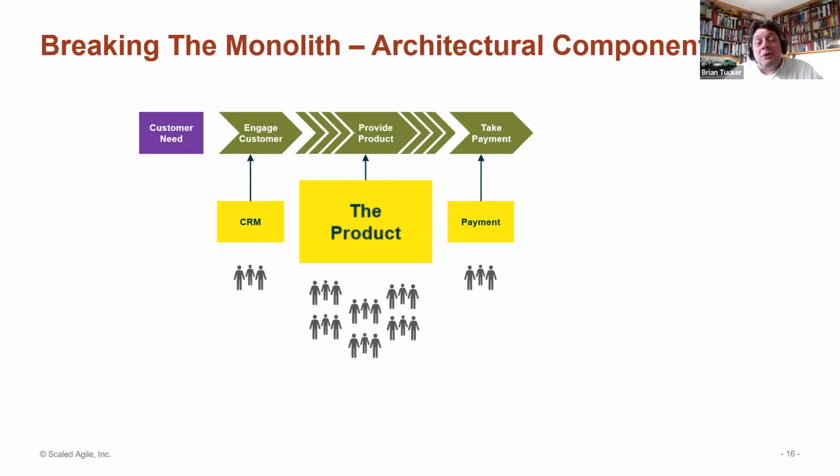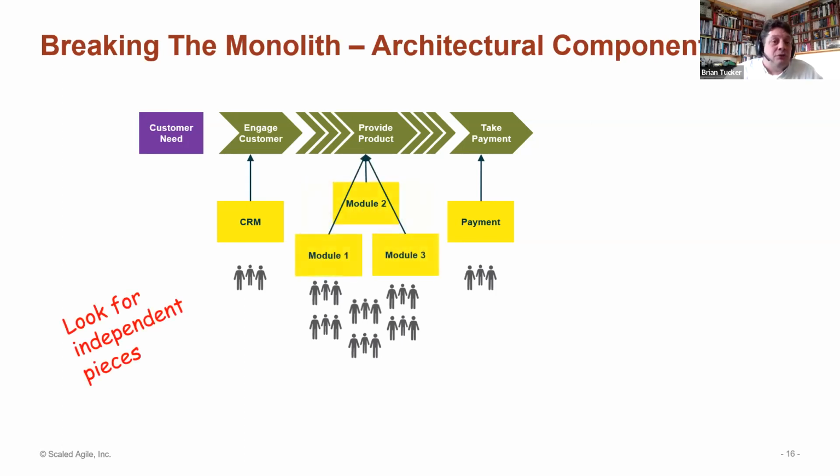Are there any subsystems, components, pieces of the monolith that are loosely coupled to the rest of the system that can be split apart and run separately from the rest with minimal collaborations or dependencies? Let's go back to the vehicle example. The power plant can typically be updated separately from steering and suspension, which is independent of interior fittings, which is independent of autonomous driving functionality. If everyone sticks to the agreed space that they are allowed to occupy and the interfaces, which would be bolt holes in the case of the mechanical design, then they can make changes as much as they like. Anything that would change the agreed space or interface would become a collaboration between the affected parties to reach sensible agreement.